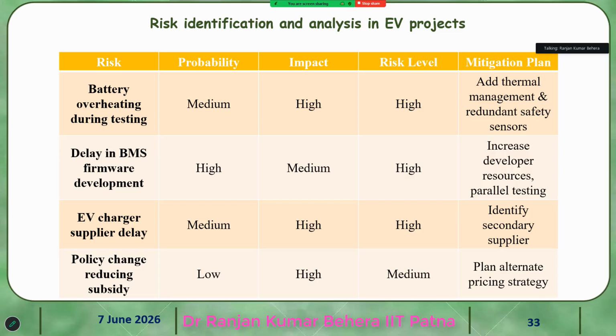And for EV charger supply delay, you see the risk level is high, so identify secondary suppliers.